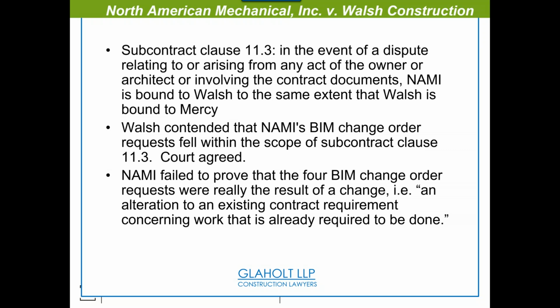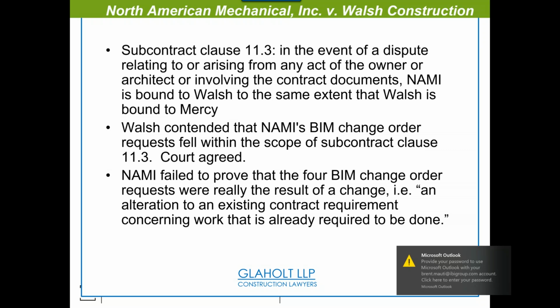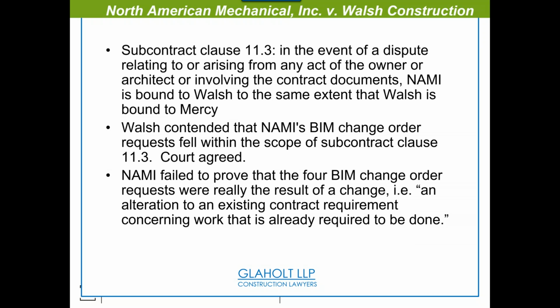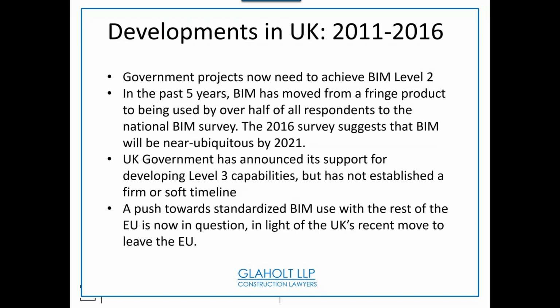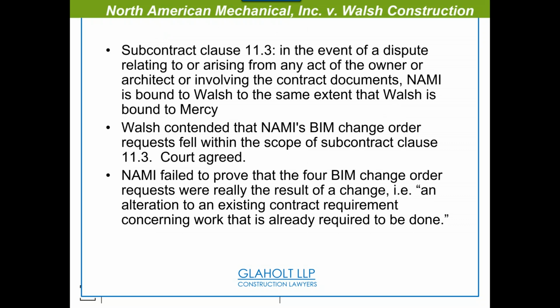If I take that model and try to do more stuff with it, identify things, see what else could be there, that could be cool. But if I try to say, oh, wait a minute, now there's a change, now there's something more that has to happen because I discovered something by using the BIM, well, the court's not going to agree because the contract was my drawings. The bid is done by the drawings, just like if you build something in reality and you discover an augmentation or something you have to do. So it's very interesting, but the point of it was that the court upheld that you can't use technology as a driver for additional scope or change.